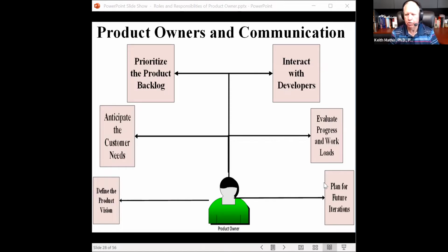So your first one is going to be probably one of your biggest and most clumsy iterations because you know the least maybe about your workers or about the project. But after you've run 2 or 3 of these, and that's the reason why most people are saying after you've run 3, you're starting to pick up an idea because you understand what's happening in these iterations and how much work they can and cannot do.